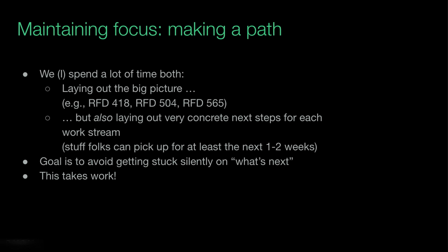So we as a team spend a lot of time both on the big picture stuff, like writing RFDs that are like, here's the vision for 6, 12 months down the road, or even a month down the road, whatever it is. But there's also a bunch of work that I put into trying to make sure that we have issues filed for the next N work streams or people, however you want to think about it, so that when people do finish whatever they're doing, they have another thing that they can go to right away, assuming that's the thing to do. I find this for myself is incredibly valuable.